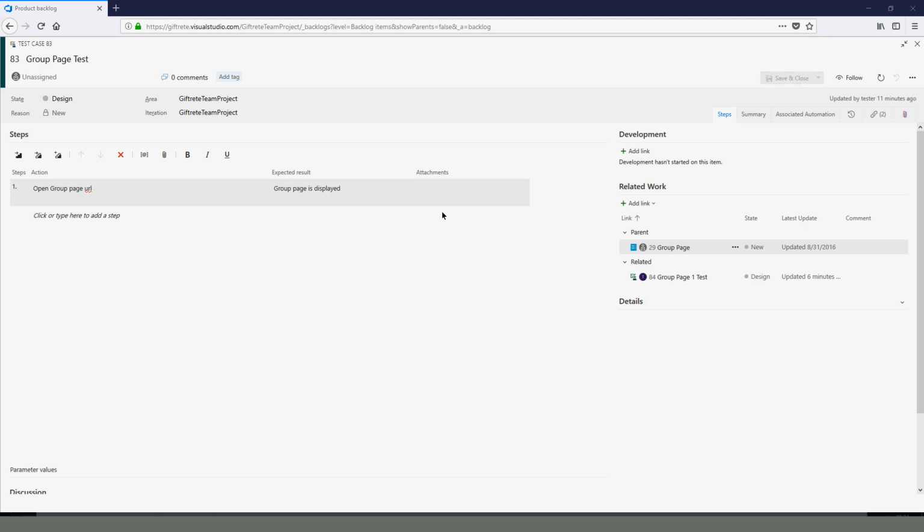In ready for QA, that's where you are ready to test it. Once you are testing it and it's passed, you move it to QA done. QA done means it's ready to go live. Don't worry about this one, it's not normally used. Then from there, maybe it goes to done, which means it's ready to be released. So that is that.